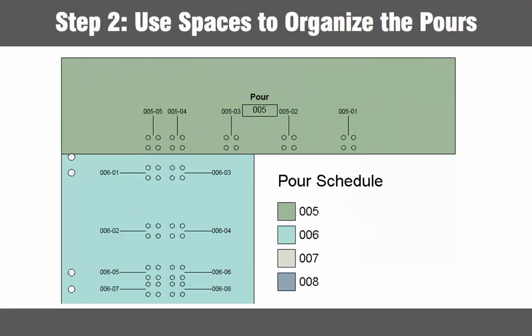Step two is to define a construction sequencing method. One way to assign sequencing data is through the use of spaces. In our example each Revit space will be used to identify a concrete pour.